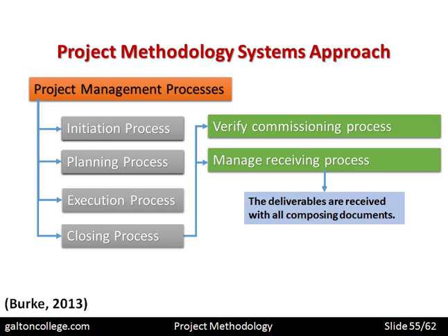So at this stage, everything should be handed over to the department that commissioned it, and documentation, as I said, should be clear, well set out, and all of the findings, including issues that have to be perhaps watched out for in case of breakage, or issues which were not tested fully, or issues which perhaps could not be tested fully because there were resources or issues about timings or whatever it was.